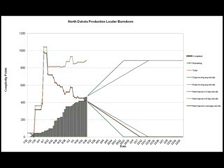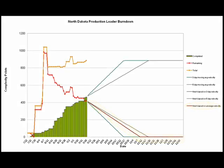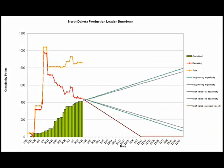The first velocity number is the three-day moving average — it adds up the number of complexity points completed over the past three days and divides by three. There is also a five-day moving average velocity and an overall project average velocity. These velocity values are used to project various possibilities for when the project may be complete, based on the knowledge the team has to date. Here we see the green line projecting a finish date based on the three-day velocity, the gray line showing the finish date based on the five-day velocity, and the brown line showing a projected finish date based on the overall average velocity.